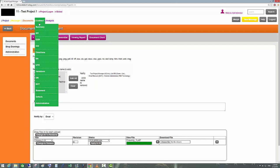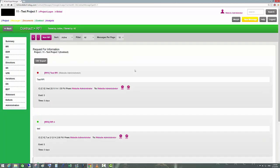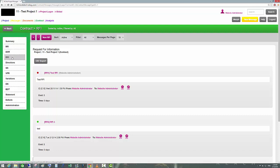The next section to look at is Contracts. Contracts are like standard messages but in a more unified form. Contracts can be Requests for Information, Design Change Requests, Variations, or Extensions of Time.